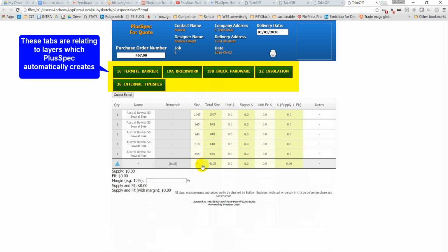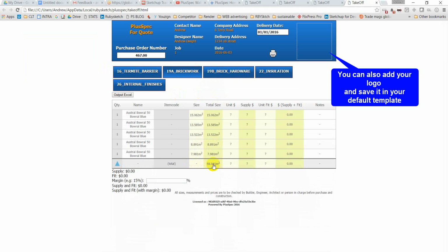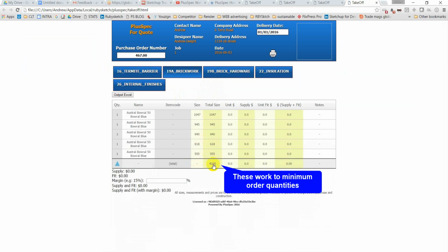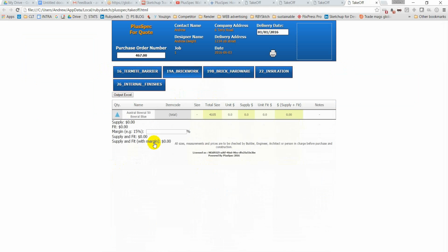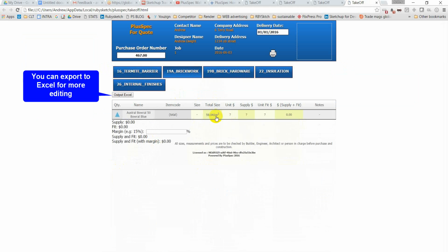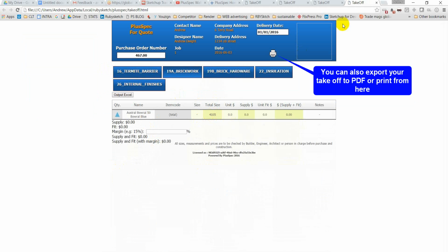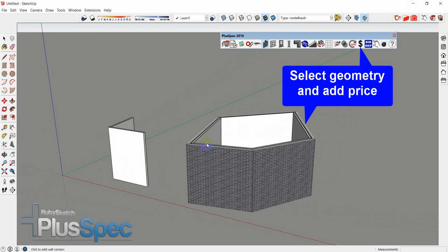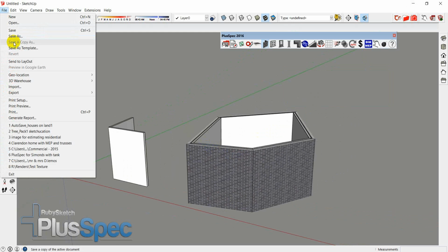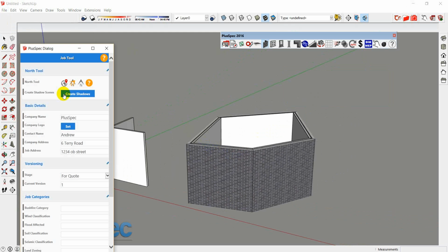Notice with brickwork, you can actually change how it wants to be estimated. So square meters or the amount of bricks. You can obviously slim it down a little bit and just have the total number of bricks or the square meters of bricks. There's a lot that you can do inside of here, guys. So the main thing is that now every time I went to File, Save as Template, after I had filled this in here, do yourself a favor, fill it in correctly.